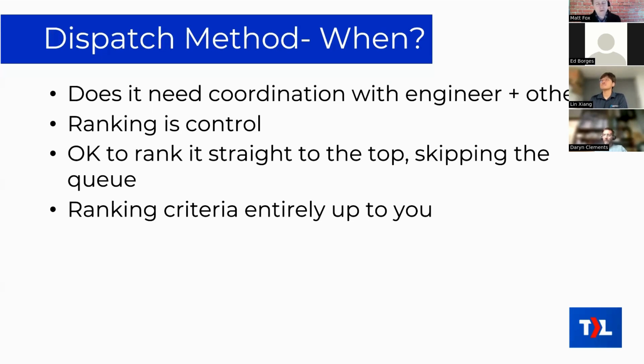So, some people have asked me in that regard, how does a dispatcher maintain control then? Because maybe they don't know anything except putting things into the calendar. So the calendar was how the dispatcher kept control over how the work got done. And they just don't know any different. Well, in Kanban, the equivalent thing to the calendar is the ranking of tickets relative to the other tickets. That is the control.